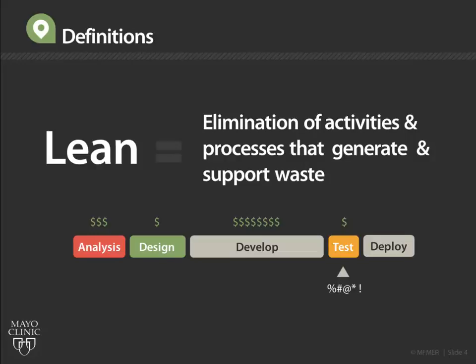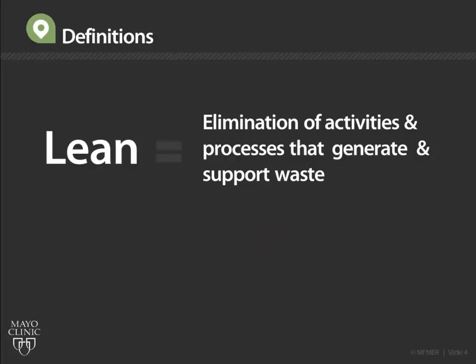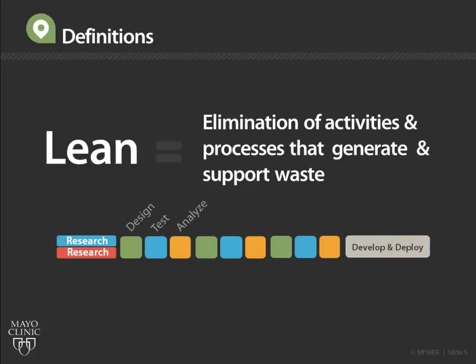At this point, it's too late to make major changes to the project, so the project manager tacks on a phase 2 to the project plan, and promises are made to fix the problem in the next release. This is what happens when you only perform one iteration of the design, test, analyze cycle. Now, what if we did more iterations instead? We could spend less on design and development, and we could test a very early prototype. Then we could identify major problems and fix them in the next design and test phases.